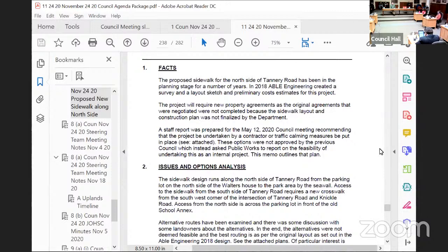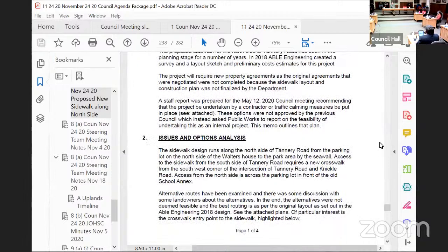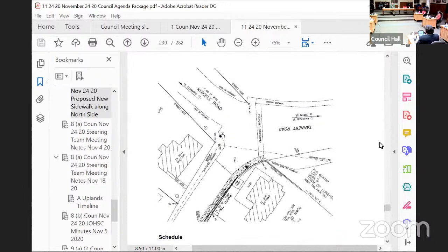But through my experience now with the town over the last year, I see that our forces are really good at doing work underneath the ground on the more vital assets, and sidewalks are a fairly straightforward thing to build. Given a time estimate of about 8 weeks of our crew's time to build this, I think it's a pretty low value use of their time.